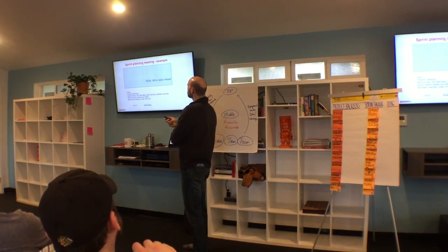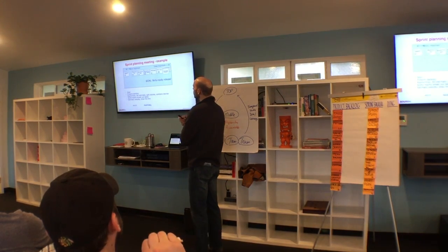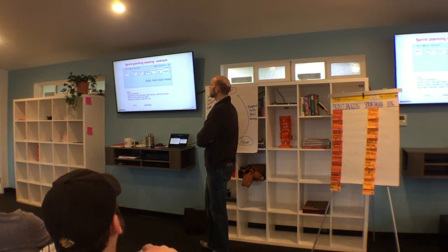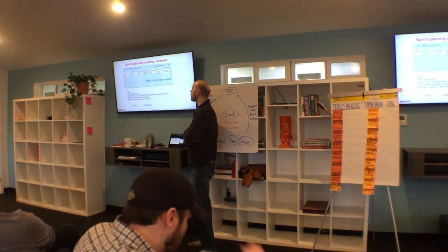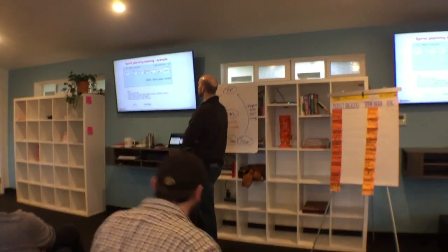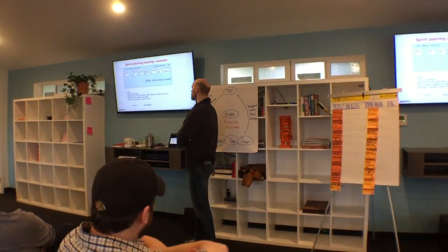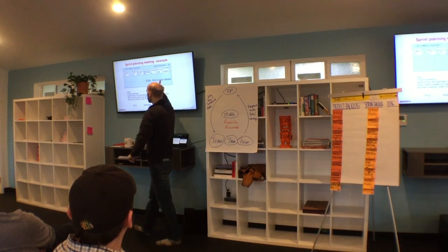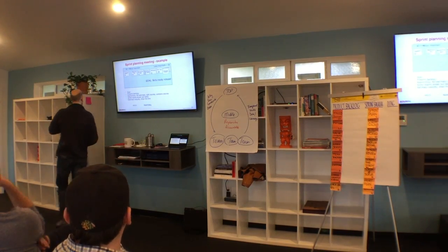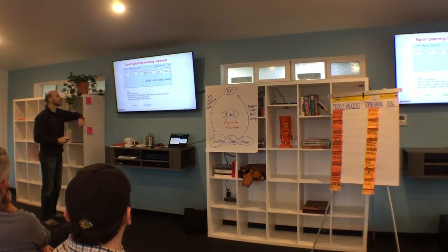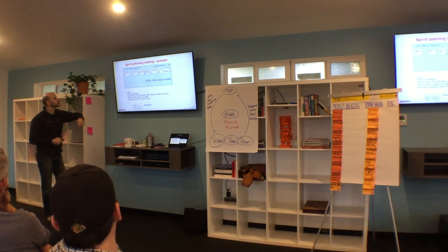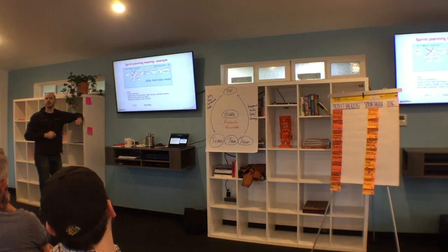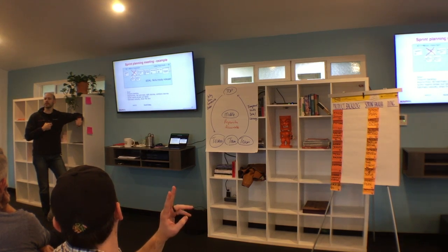The team asked the Scrum Master to put up their product backlog, or the top of it, in sticky notes on the wall. And they arranged them from more important to less important from the product owner's perspective. The product owner writes their wished goal on the wall. In this case, goal, beta ready release. The team says, migration tool is kind of big. That could mean a few things. Product owner, if we deliver user migration tool and transaction migration tool, is that enough for beta ready release? The product owner says, yes, that's enough.